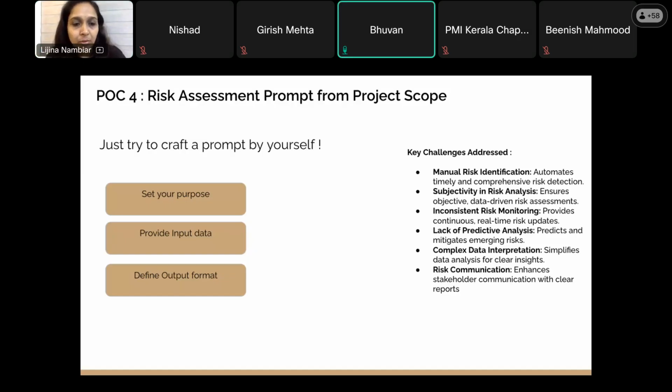For example, you can attach this. One example is the customer will tolerate a maximum of 10 bugs per, say, PI cycle or per sprint cycle. Another one may be the team size needed to deliver the sprint is too small, for example. And the third one is we can say the sensitivity to schedule overrun is higher than the sensitivity for a cost overrun in the project.